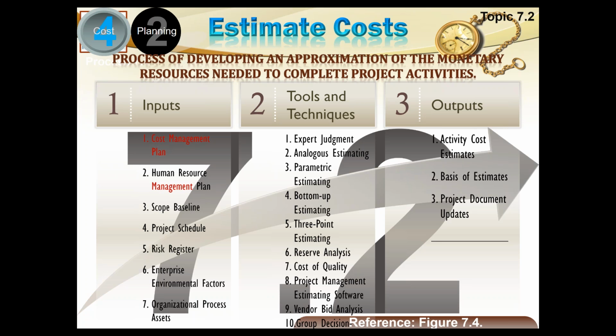The basis for estimate is basically the reason how you came to the conclusion of your estimates. So everything you estimate, you must provide a basis for that estimate. Maybe it is a formula, maybe it is an analogy, maybe whatever you have used, all the reasons are to be provided because when they have to allocate you the budget, they will have to look into it.